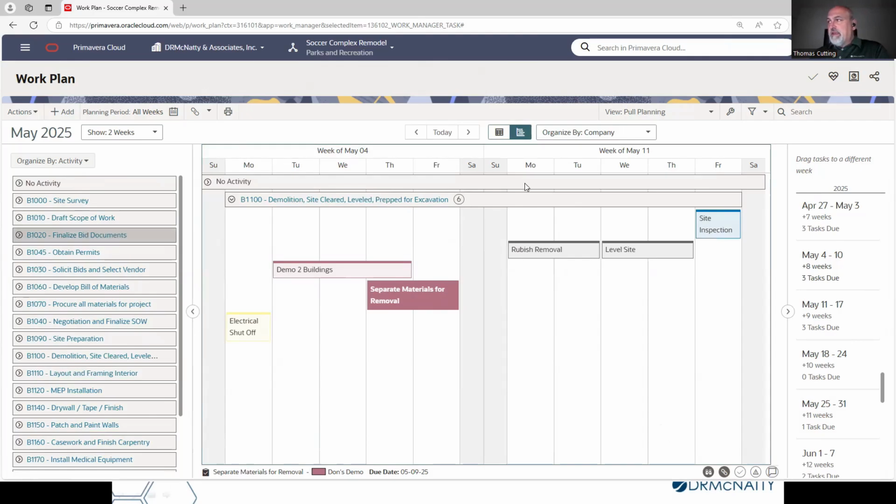So the whole process then is to set up the final activity and then ask the question, in order for this task to be complete, I need what? And then you drill it back from that to find all of the other tasks. Once that's done, you can do a forward pass to see what tasks can be run in parallel. We did that here with the handoffs, define that forward pass. And then we got the commitments from each of the teams on that.